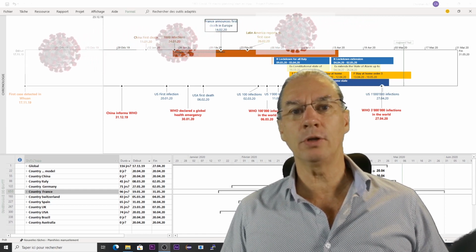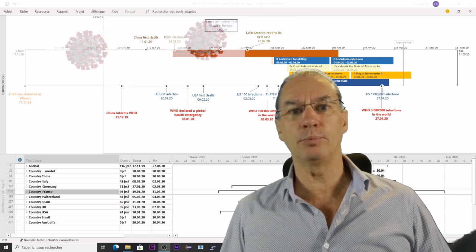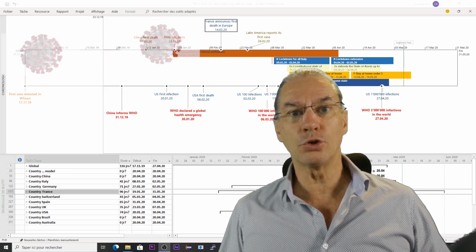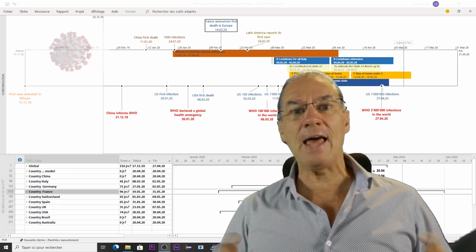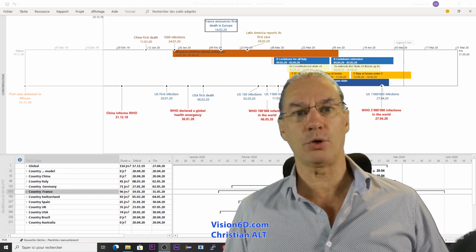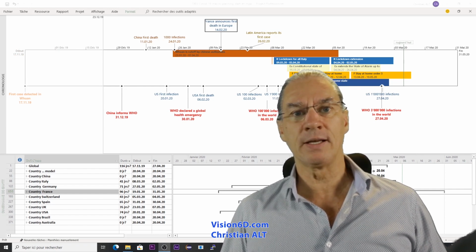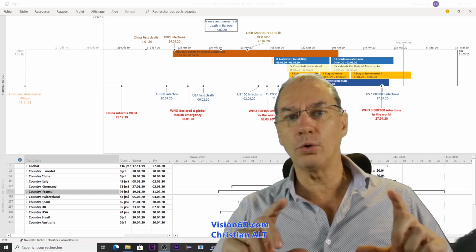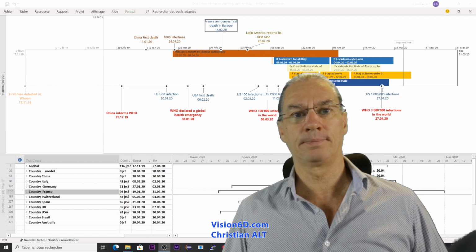At the initiation, you need to have some data to be able to give input for cost estimation to create the budget. For this, you will do a certain planning of what you will do in the project. But of course, you won't enter in all the details. You just want to have a global overview of the project.